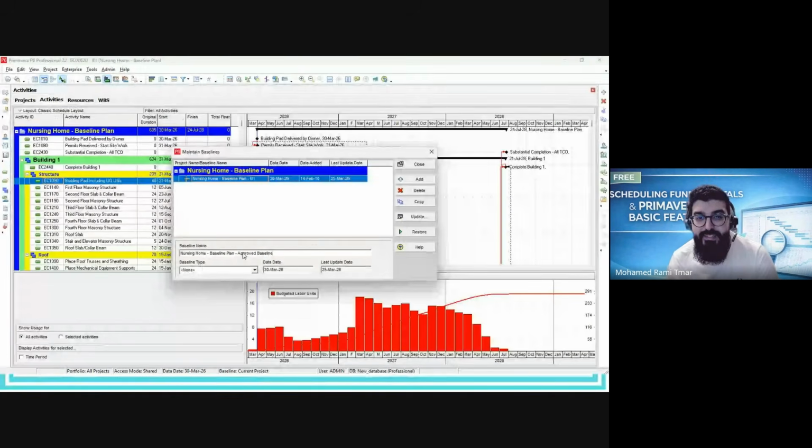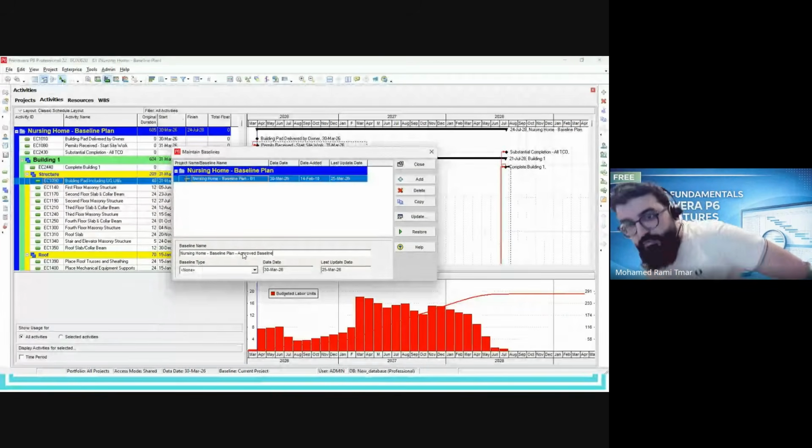Okay. Yeah, thank you, Haki, for the question. This is a very important question. How many baselines can we create in the same project? Okay. Let me answer this question. In MS Project, you can assign only 11 baselines, and with more than 11 the system will not allow you. And even if you try, it will be a bug. I mean, it will be a disaster.